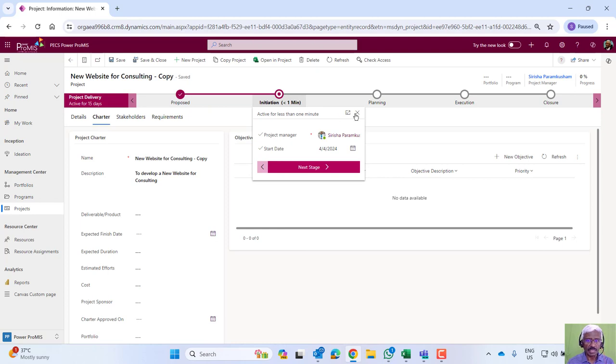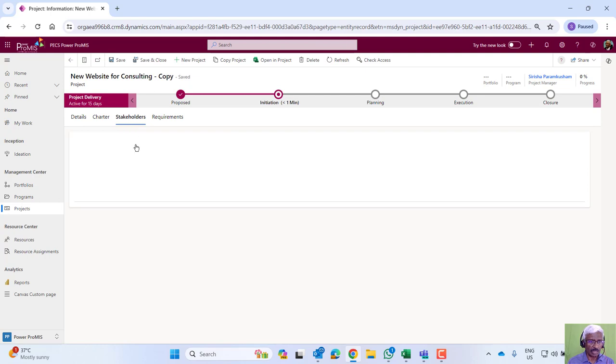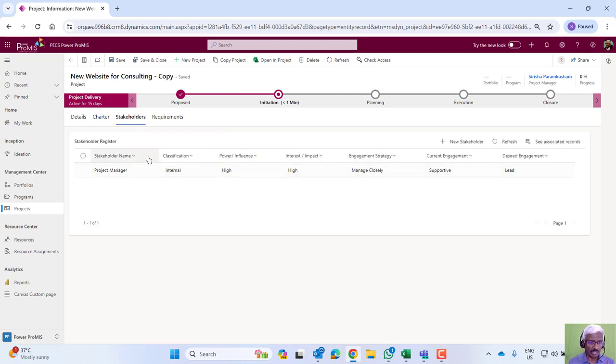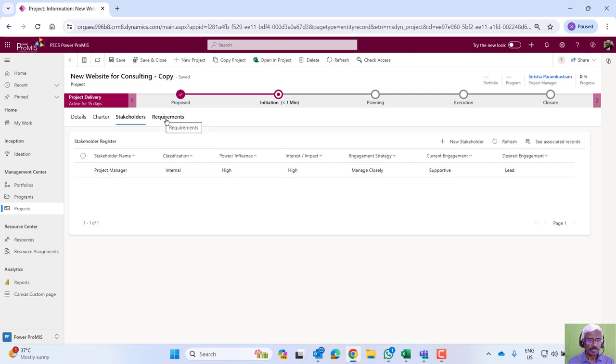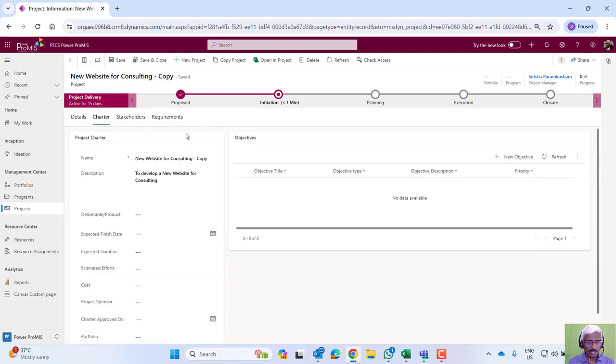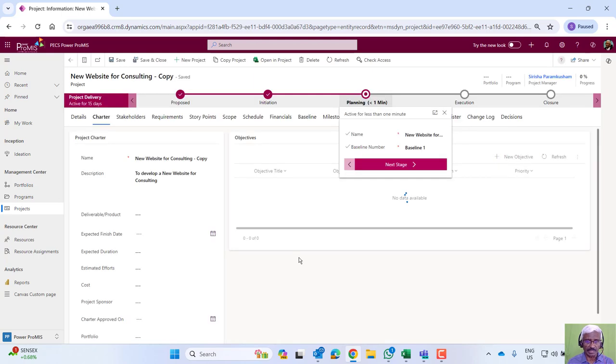Here we can finalize the charter and then record the stakeholders and their characteristics or influence, and then bring in the requirements that need to be included into the project. Then, through an approval, we move from initiation to planning.